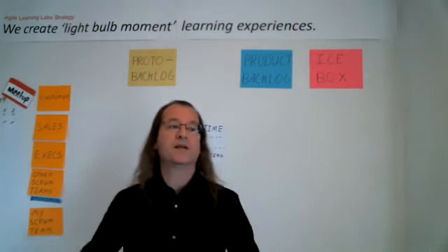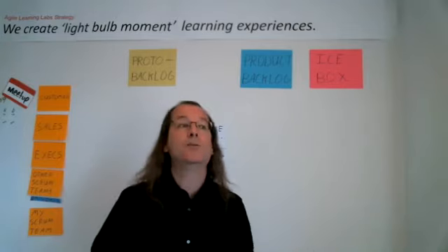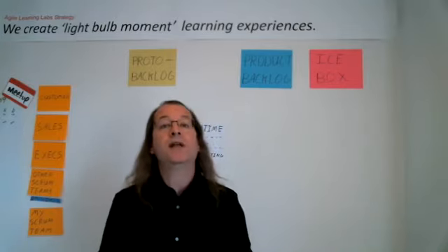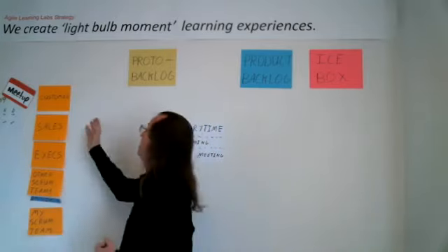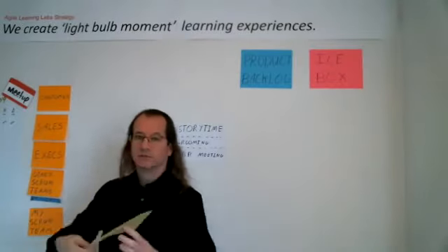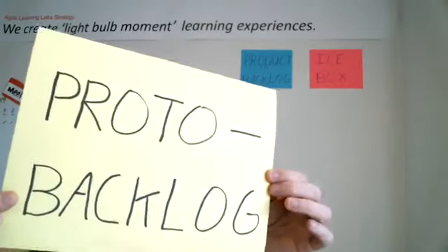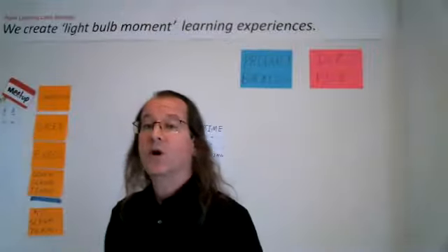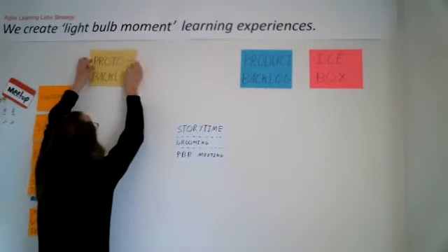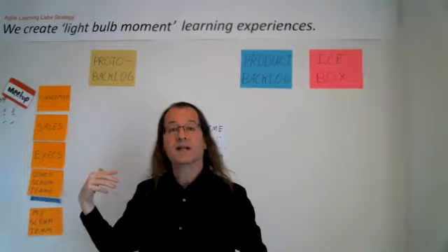And we want to keep that really clean. We don't want these things that are like half-baked ideas getting into the product backlog. So we need a place to collect them. I always call this the ProtoBacklog. So the ProtoBacklog is this place where all of these inbound requests land.